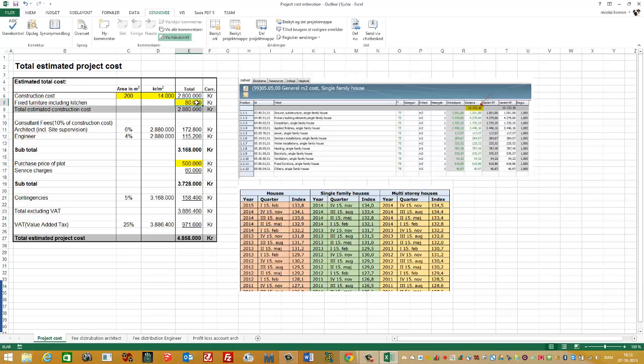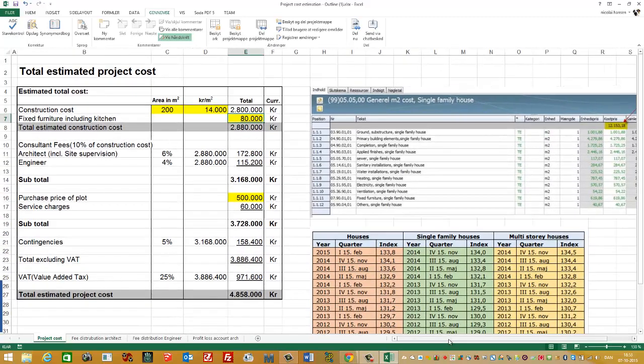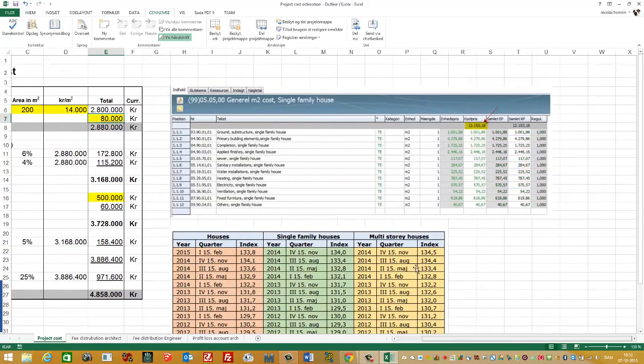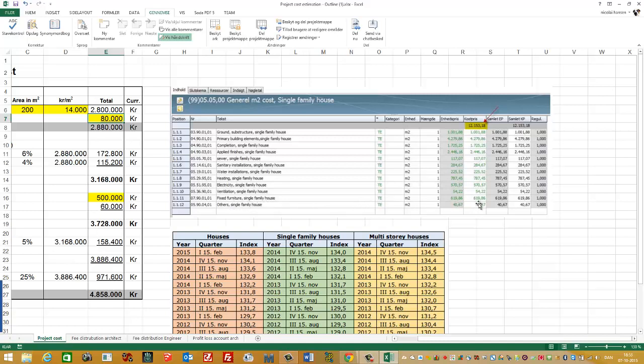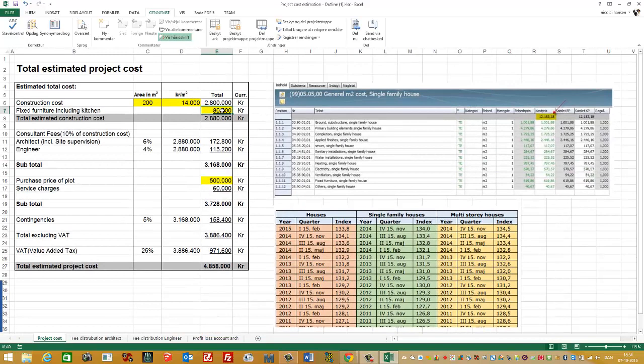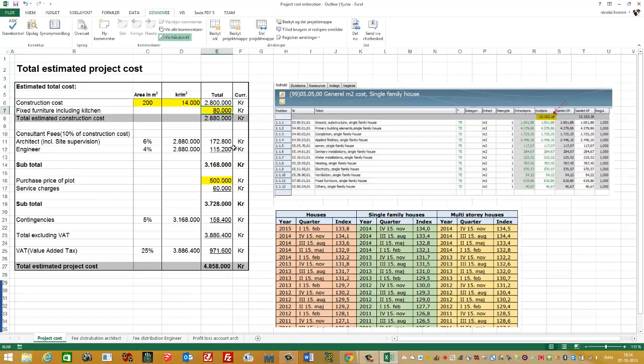Then you have the fixed furniture, including the kitchen. And this you can find here: Fixed Furniture for the single family house, it's 619 Kroner per square meter. And this you have to highlight. Then you multiply the square meter price with your area, and then you have it here. So maybe in this example, this is a little small, 18,000 Kroner, but you put in your own value.